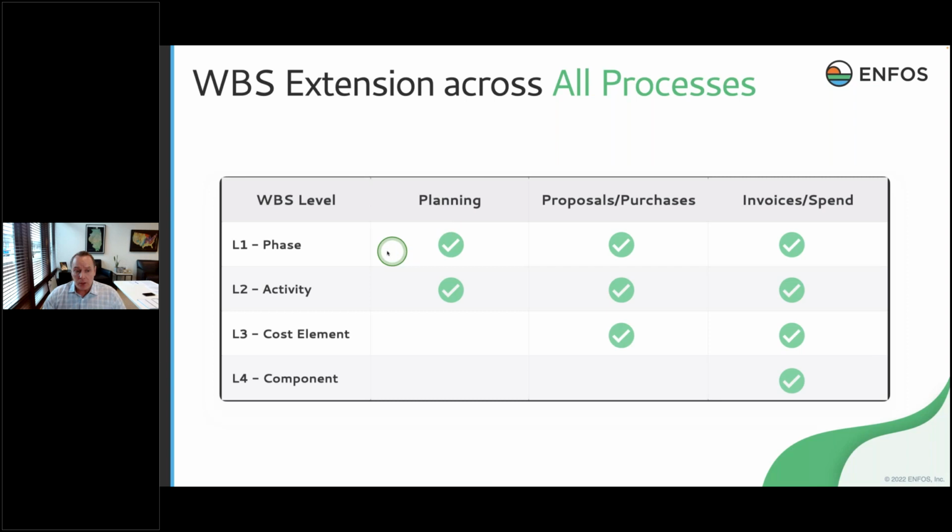Generally, I will recommend to customers, or customers will have a process that they want to follow where they're using level 1 and maybe level 2, because I'm projecting cash flow forecasts out for the next 30 years, 50 years, right? I pretty much know as I meet certain stage gates or milestones in my project what my phases and work activities are going to be. But what I don't know probably at that level is the cost element component.